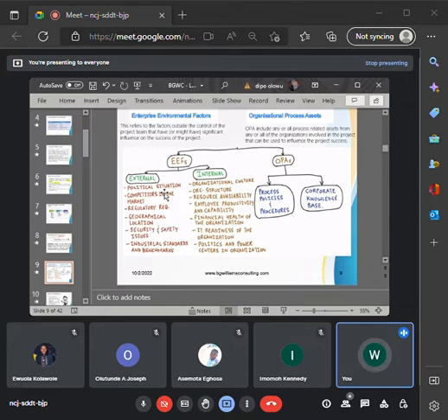Is there anything you can do about it? No. Or maybe the political situation in Borno State. There's nothing you can do about it. They are enterprise environmental factors. Or maybe government regulations, where they say this is a new regulatory requirement. Like some time ago, the Nigerian Communications Commission decided to say, okay, there must be SIM registration. You see, all our network providers decided to embark on SIM registration projects. There is nothing you can do about it. Why? Because the government made it regulatory.